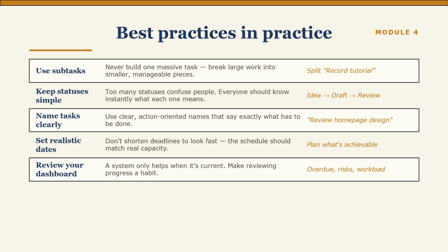If a task is too large, we can break it down into smaller subtasks. So that's where the subtask comes in. For example, under gather website requirements, we could have subtasks for meeting with stakeholders, documenting requirements, reviewing requirements, and getting approvals. Finally, we have checklists. Checklists are useful when a task contains several small steps that don't necessarily need to be managed as separate tasks. Understanding this hierarchy is important because it determines how you structure your project in ClickUp.